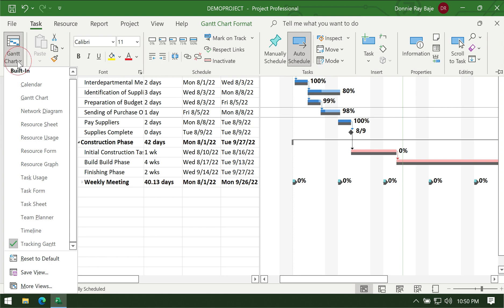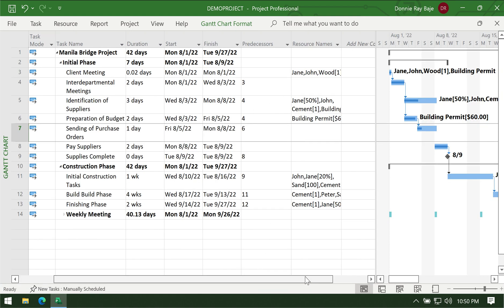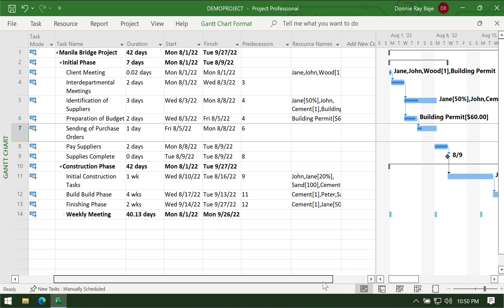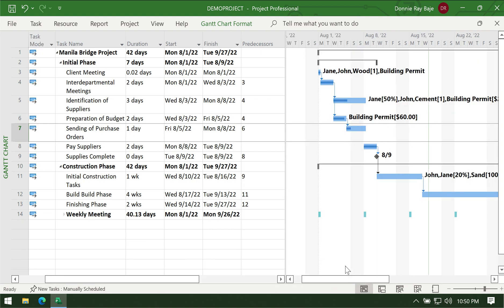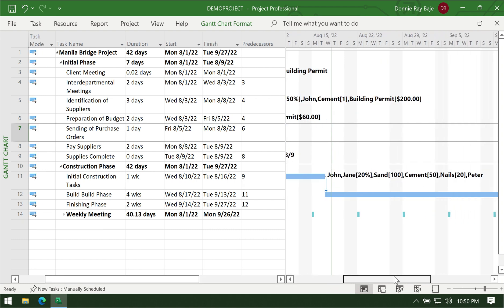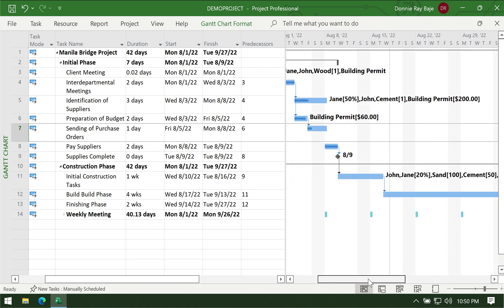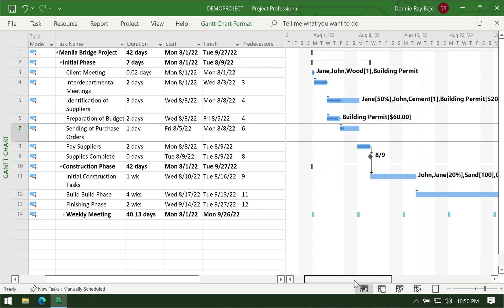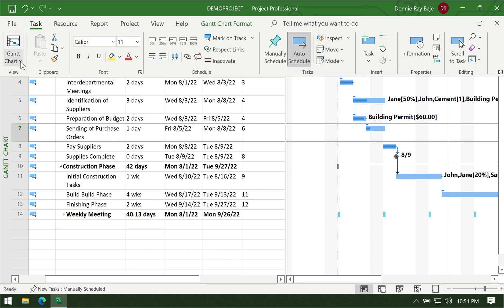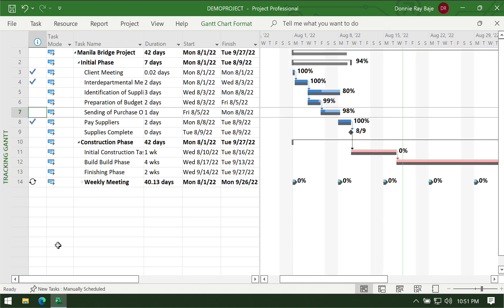So that you can easily compare the baseline to the current status of the project. On the other hand, if you are in the regular Gantt chart, you won't see the baselines showing up. The bars here do not have any indication whether they were part of the original timeline or not.